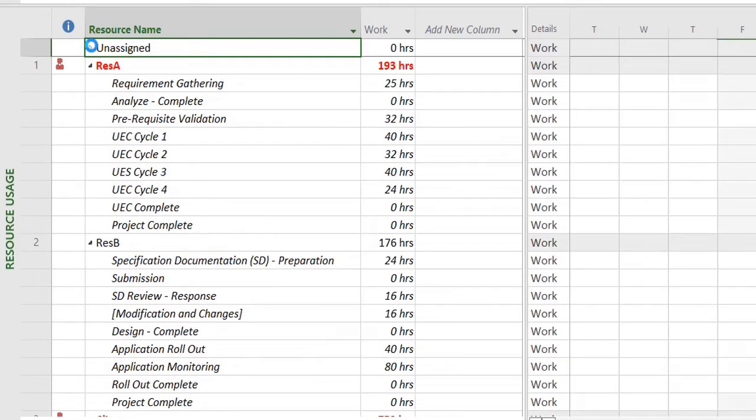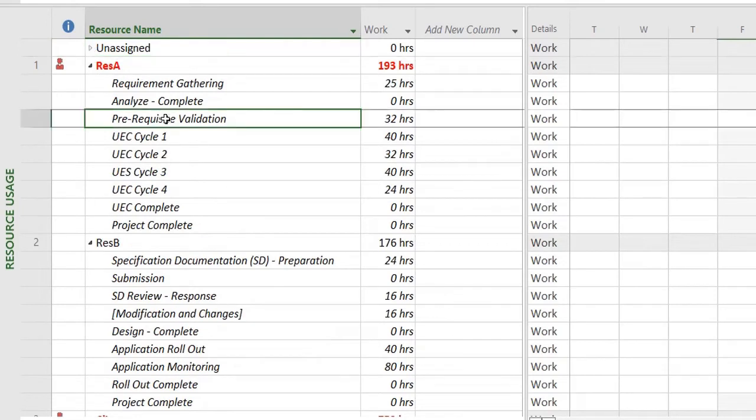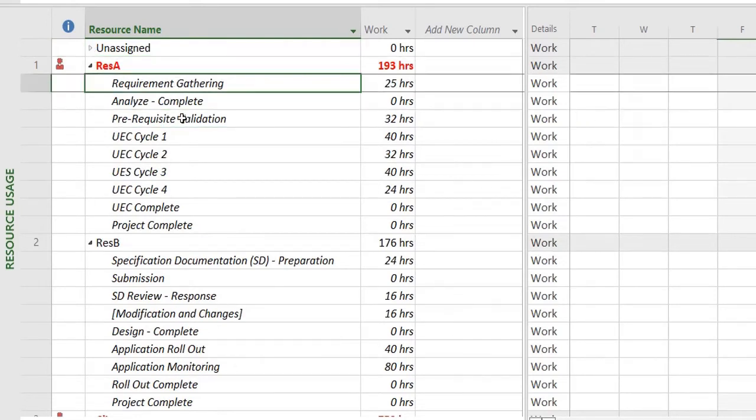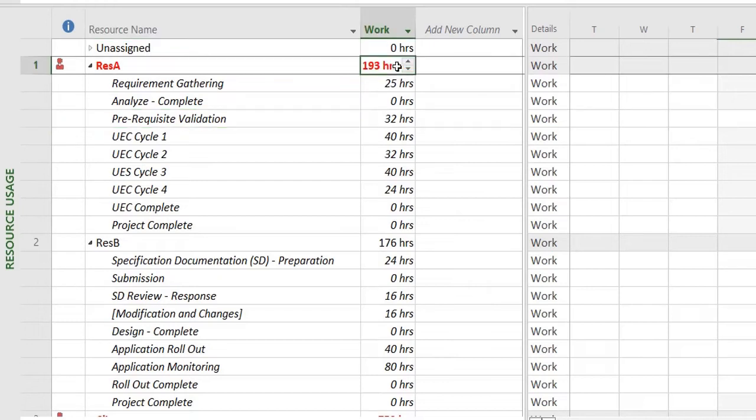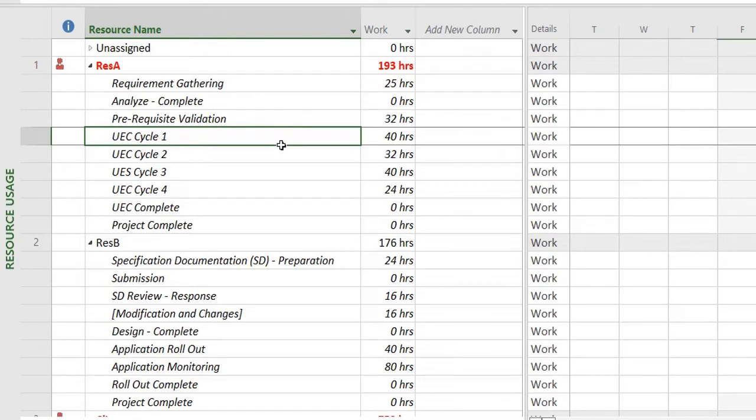So right now we have a lot of items in our project plan that don't have any resource assigned to them. Then we have Resource A that's doing some work, and the red mark is showing you that this resource is over-allocated.